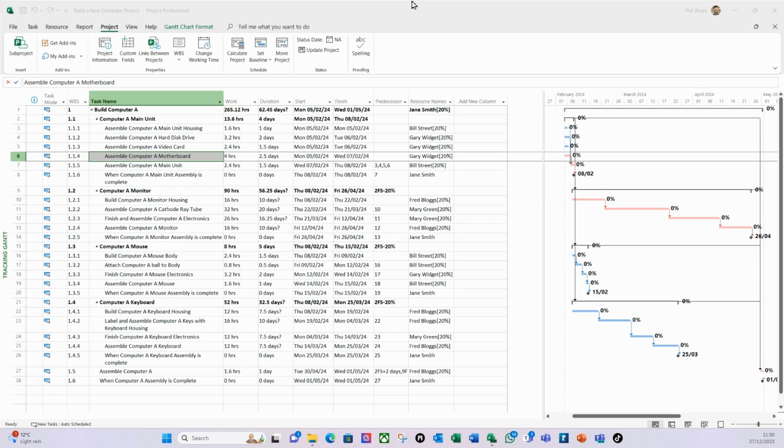And the way that I've decided to go about this is I'm going to use the master schedule, the resource pool and the leveling capability of MS Project to give me an idea when this program can be completed without over allocating our resources, i.e. all 4 projects are achievable within the timeline forecasted.